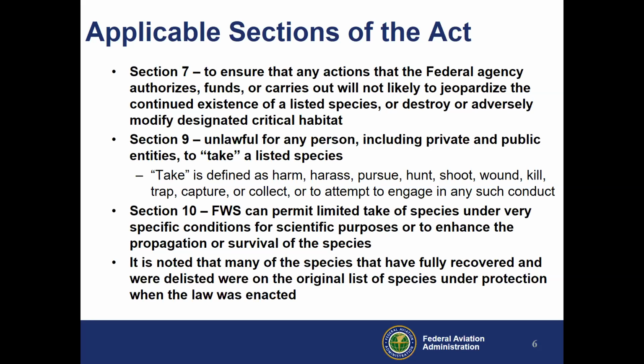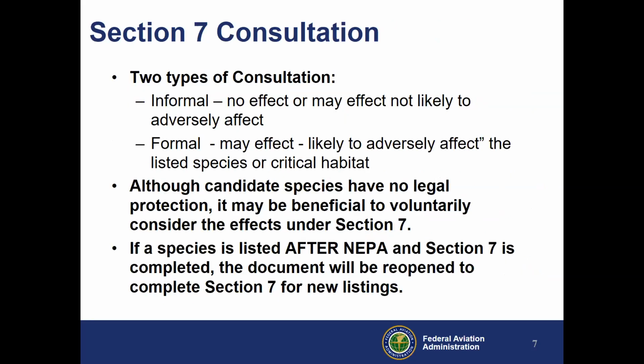So Section 7 consultation, there's actually two types of consultation, whether it be informal or formal. In most cases, we handle our consultation with Fish and Wildlife informally because most of our projects result in either a no effect or a may affect not likely to adversely affect. There's a rare occasion, though, that we may have an effect that's likely to adversely affect the species or the habitat upon which they live.